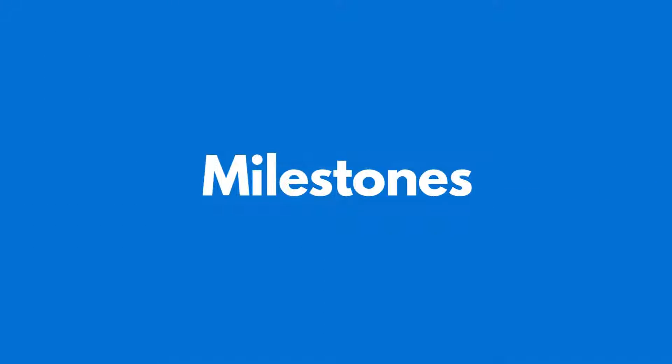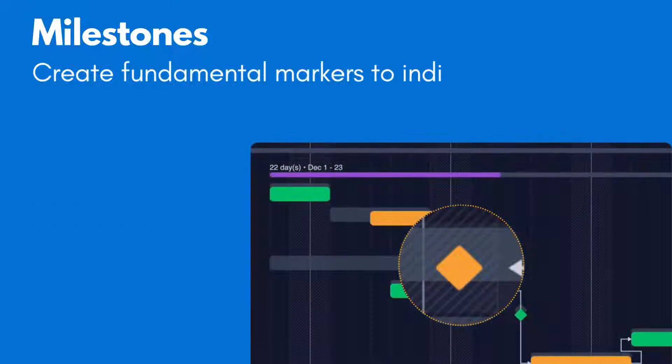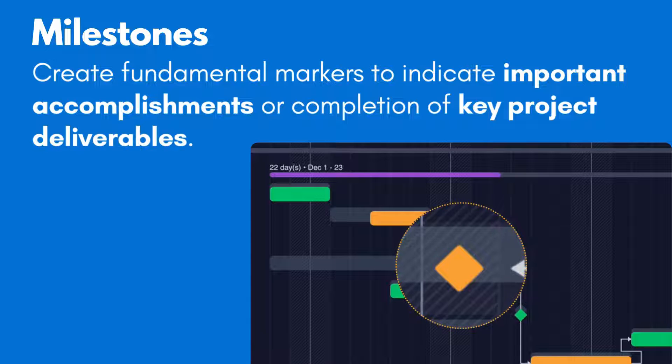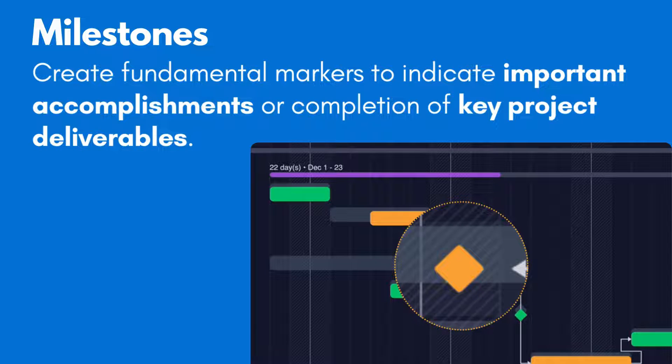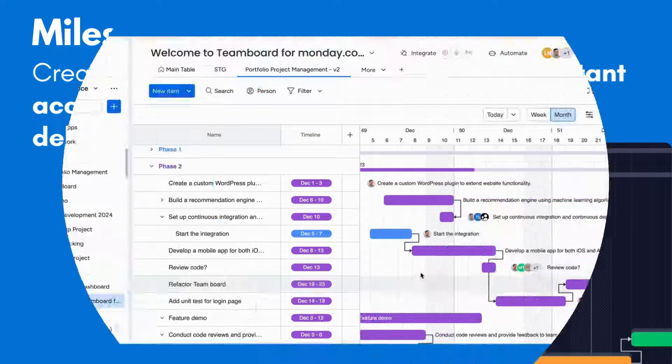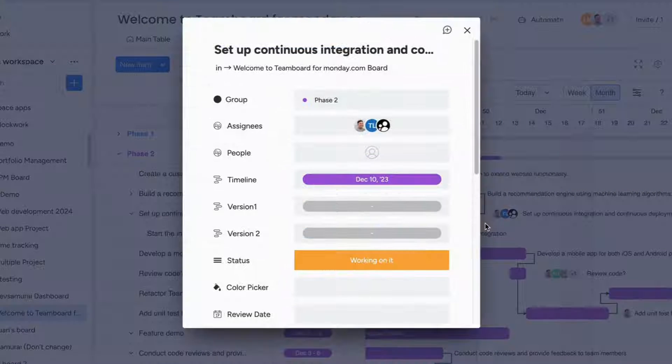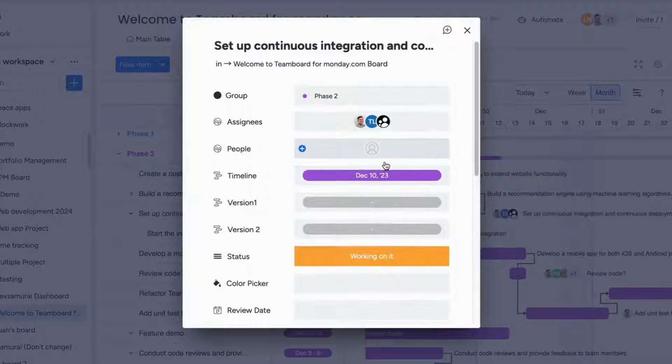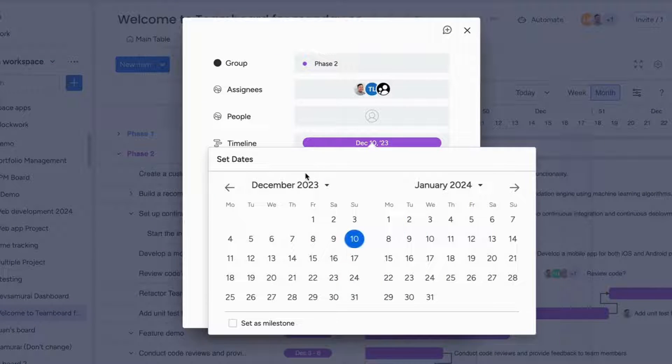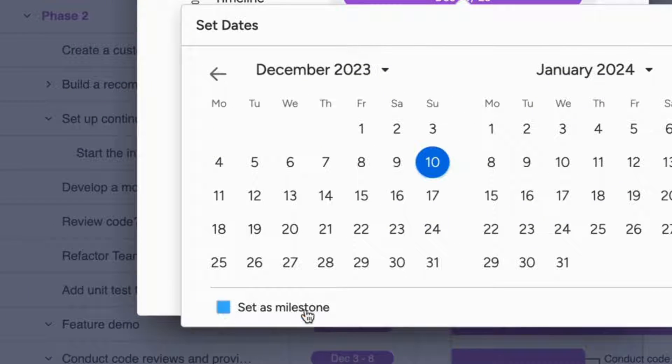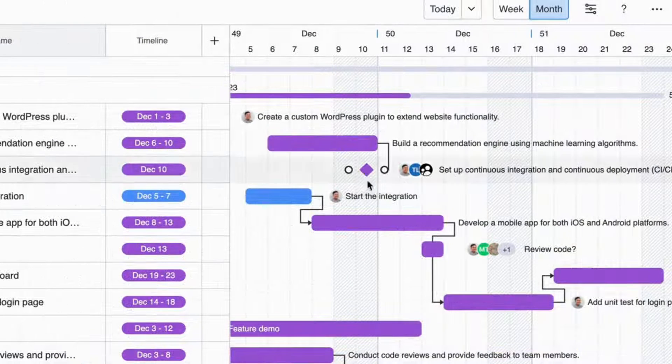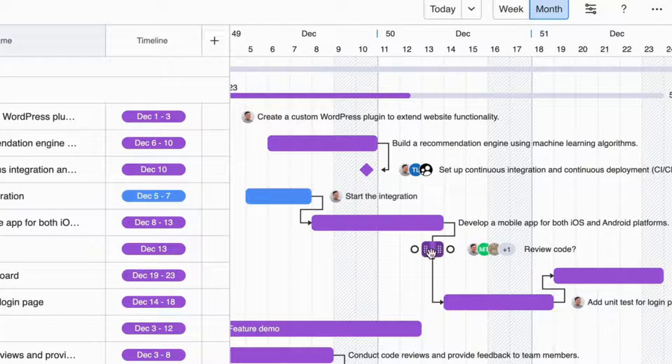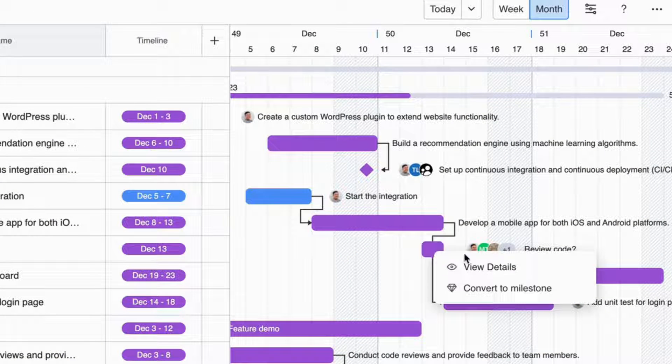With the milestone feature, you can create fundamental markers to indicate important accomplishments or completion of key project deliverables. To visualize this milestone on the PPM's board, you can choose a specific task and check the box for converting that task into a milestone in the Timeline tab. Or, you can do it faster by right-clicking on the task itself.